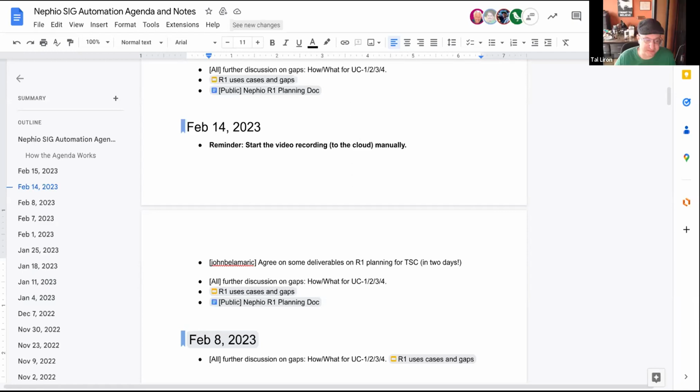My idea is pretty straightforward: just go over that document and turn the actual bullet points into issues. And again, we can delete the issues, we can put them to later. That doc should be the source of truth for opening any issues, so you should be able to trace it back. Ultimately, GitHub becomes the source of truth, Fish. The document was intended to, just from a point of process, I tend to find docs quicker to interact on than issues sometimes. But they're also not as discoverable, so really the source of truth should all move into GitHub, and maybe it's making things worse to start things in docs. So I'm fine with moving everything in that doc to different issues and deprecating the doc.